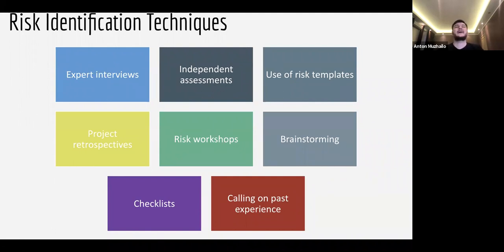You can ask, well, it looks good in theory, but how is it in real life? In real life, this is it. You can gather the list of requirements, the list of acceptance criteria, whatever. You can just go through each item in the list and say, okay, let's pick the first item. What can go wrong with this? Okay, we'll put it in the list, go next. What can go wrong with this? Have another list. What can go wrong with the third item, fourth item, fifth item, etc. So all in all, we can define the risk for each element in the list. It may be the requirements, like everything, and come up with a certain list altogether, what is relevant to this piece or to this product.